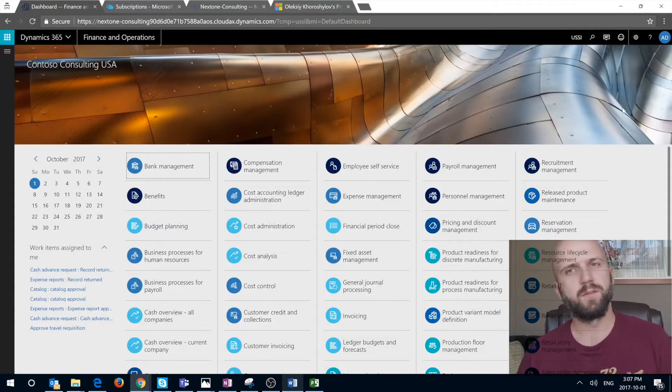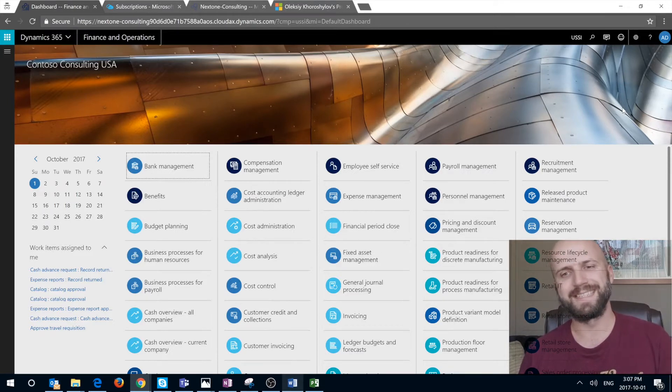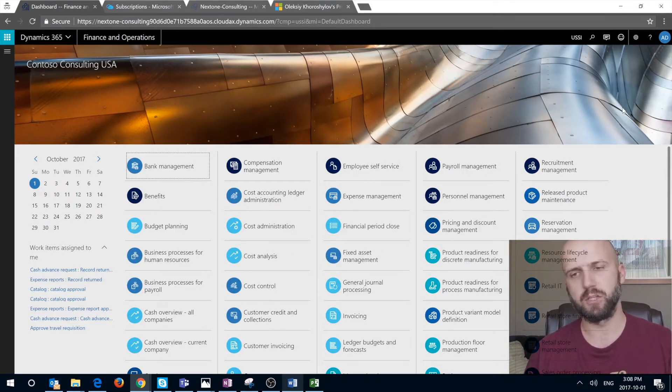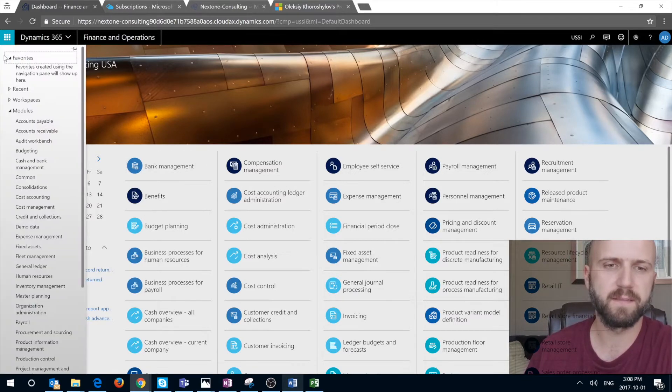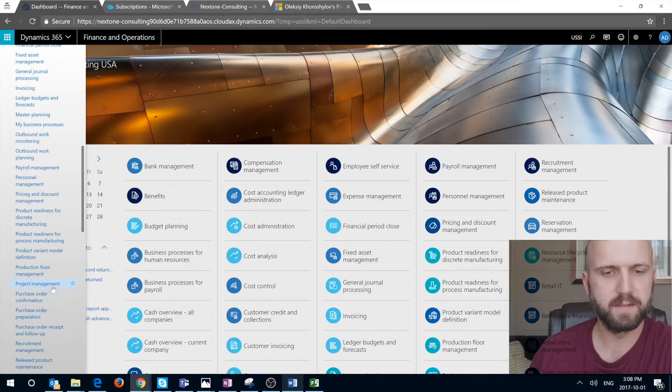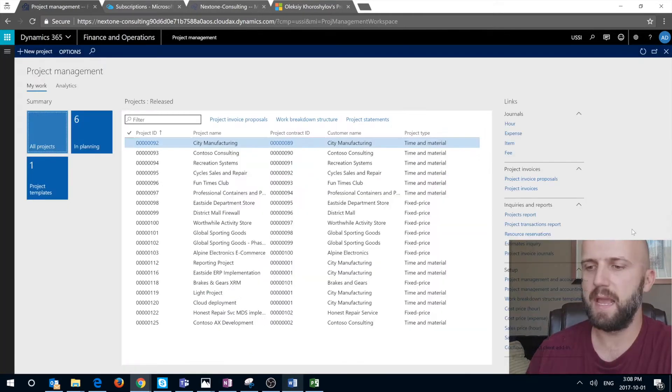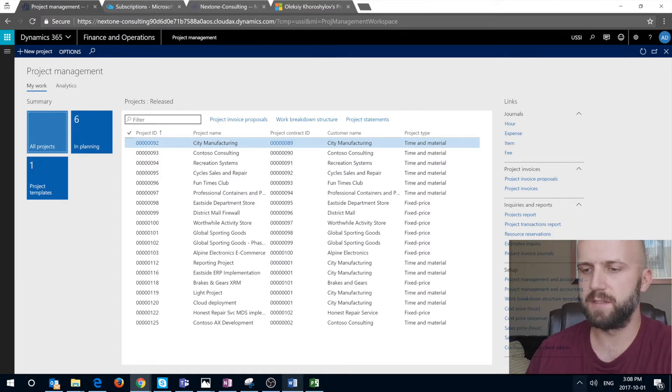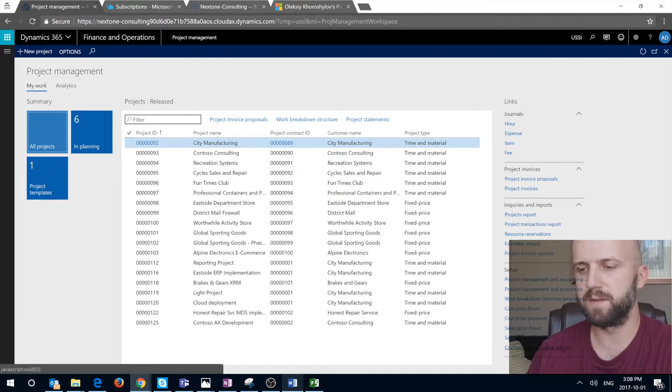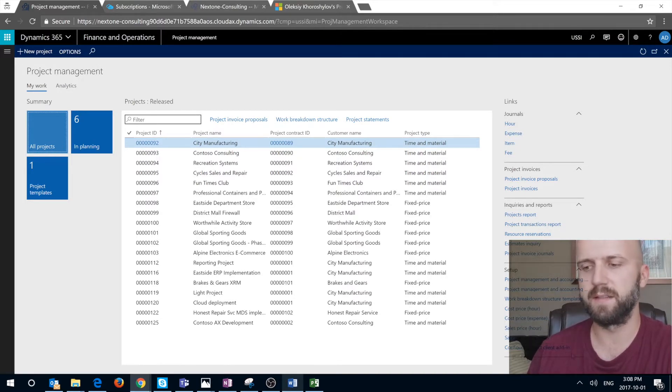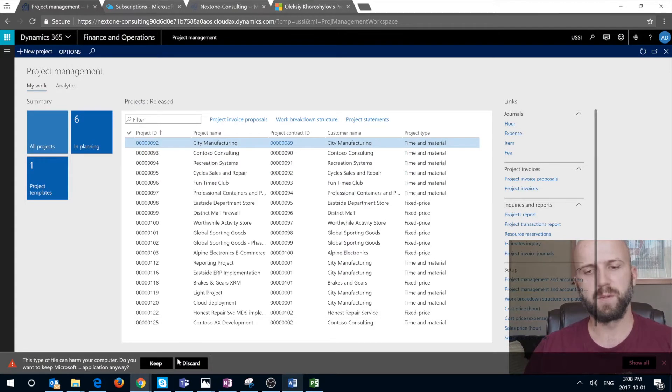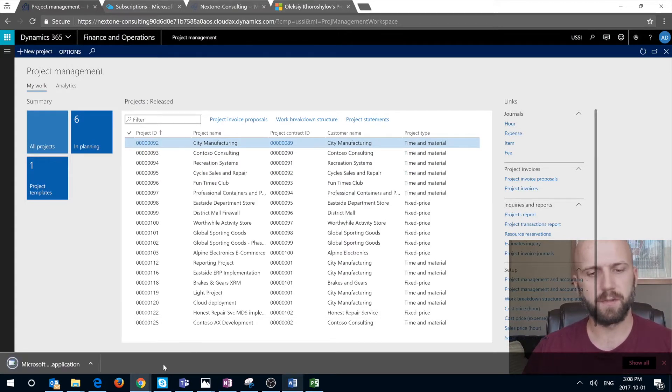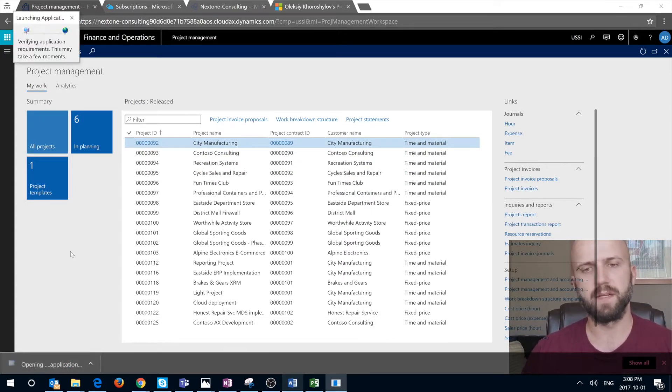First thing you need to do is download an add-in and make sure that it is installed on your Microsoft Project client. To do so we have to navigate to workspaces, select project management and under links section on the right hand side under setup we can see configure project client add-in. You will see a file being downloaded that I'm going to keep and then you have to execute on that file.